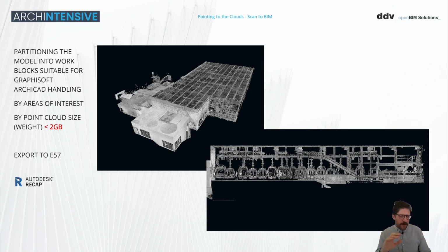And the other constraint to proceed with this partitioning is, of course, the type of asset. If it's a building, usually we are splitting that point load by floors, but sometimes if the building is quite big, I remember a train station that we have modeled.